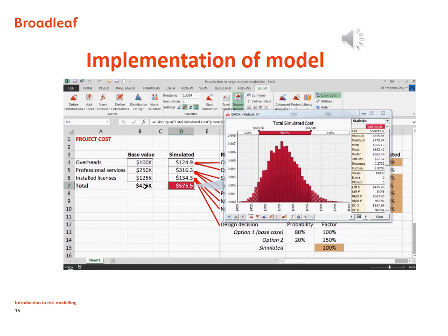So remember, we're starting with a base estimate of $475,000, and occasionally, if all those factors move in the right direction, it's coming down to around $400,000. And also, occasionally, if they all go in the wrong direction at the same time, it's getting up around $750,000.